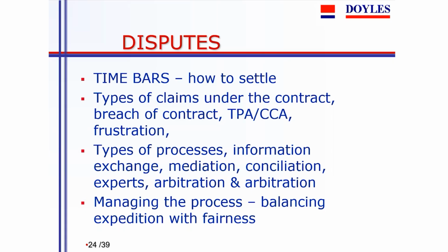The alternative is an expert determination. So you can go to an expert to say, we have a problem over the valuation of this variation. We're $100,000 apart on this valuation. And the expert will conduct some inquiries and do some analysis of the situation, and he will come up with a decision. And if he follows the requirements of what he was asked to do and conducts himself in an appropriate way, his decision will usually, 90% so, be adopted by a court if anyone wants to debate it.